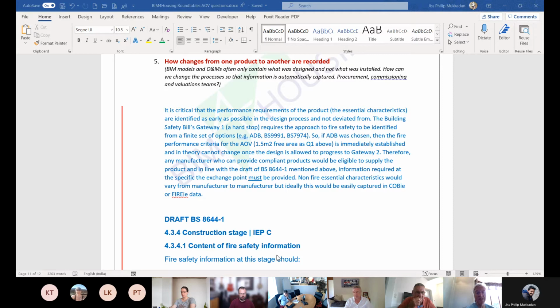But what we said yesterday, and I see Susanna and Edward, I think, agreed with this yesterday, we ought to be adopting that same methodology in existing buildings. So although it's not as easy, we ought to be able to record what door closer was actually being used, what door closer we are replacing with what new door closer, and then making sure that we've got a proper handover process between the two.